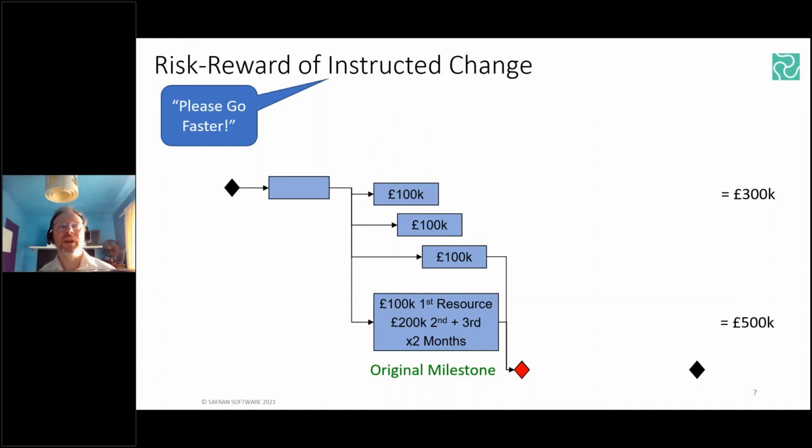double. Furthermore, there's a tangible risk that the original resource that we had on that particular activity will want to renegotiate their rate as compensation for the lost business, but also the difficulties that they will now say that they're exposed to in terms of having to share this overly congested underground work site, potentially 4 times as many people down inside that box than was originally planned for. And also, they now have this potential for frustrated access and egress and other new systemic risks that just simply weren't there before. And there's this contagion potential that is there now.